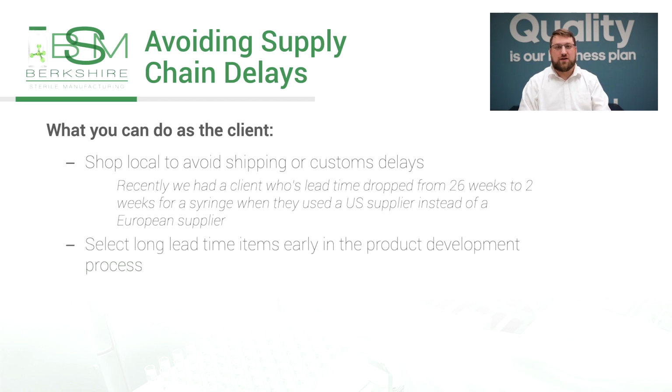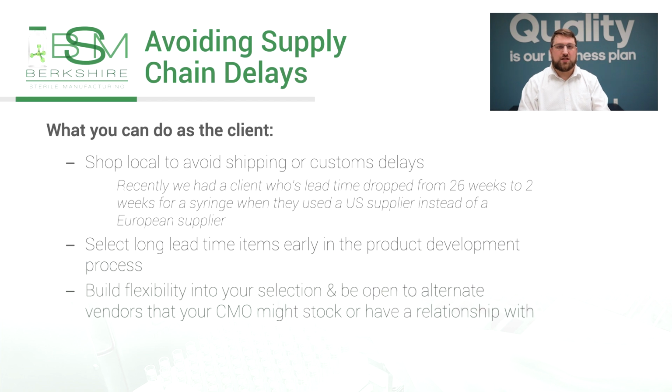Select long lead time items like filters and container closures early in the product development process. Build flexibility into your material selections where you can, and be open to alternate vendors that your CMO might stock or have a favorable relationship with regarding supplies. Like I said before, we purchased a lot of stock of common containers and closures. We currently have over $1 million worth of inventory at our facility.